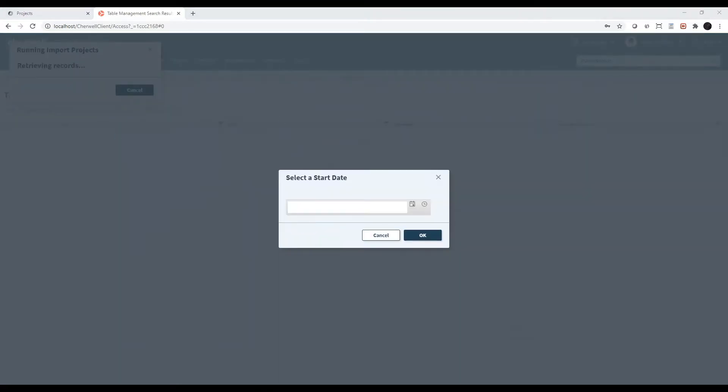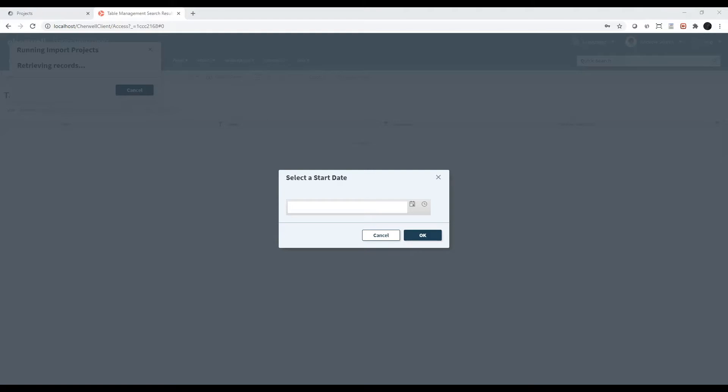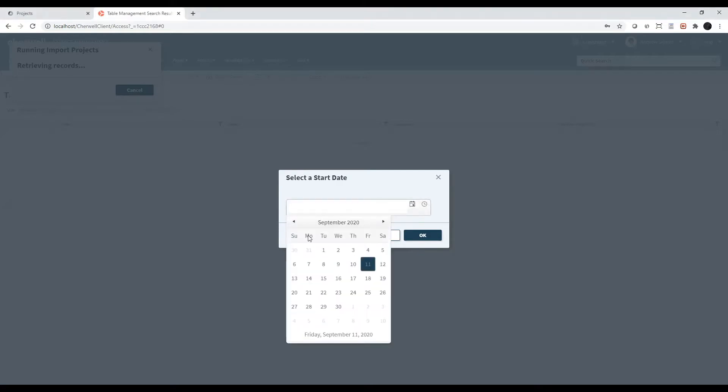It's important to import projects before tasks because every task is associated to a project. This import uses a filter on the last modified date in PlanVue. Be sure to select a start date that is earlier than the last modified date on the projects that you wish to import. I want to import all my projects, so I'm going to select a date that's a few years back.